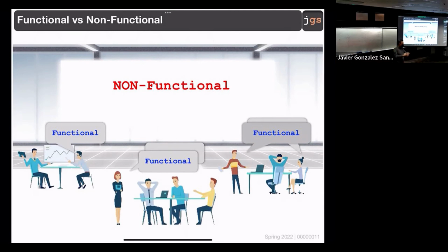At some point, we're going to put things together, integration. But each requirement can be done by an independent group of developers. Remember, independency for requirements is about, can I ask a group of developers, or one developer, to do this? And can that developer or group of developers work without being in contact with others? The Pacman, the ghost, can you work on moving the Pacman without having the ghost? Or can you work on moving the ghost without having the Pacman? Or can you work on drawing the maze without having the Pacman or the ghost?